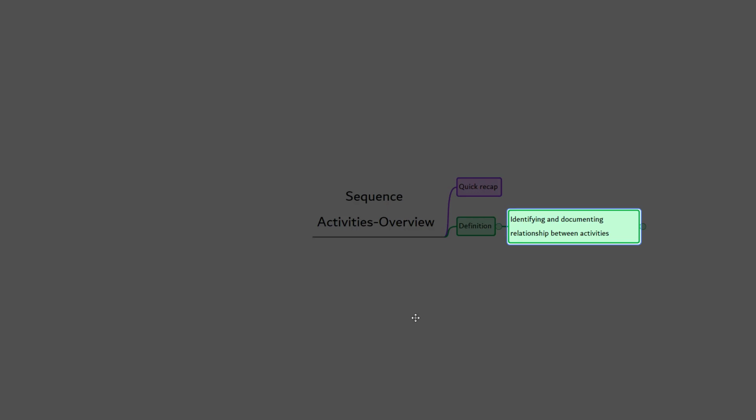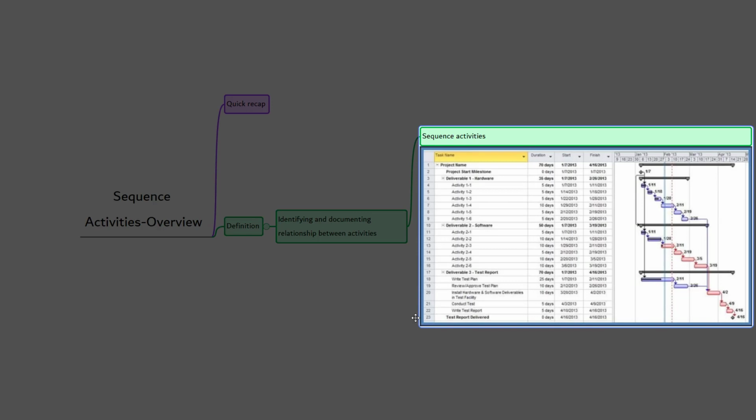Generally, every activity except the first and the last should be connected with at least one predecessor and at least one successor activity with an appropriate logical relationship. Anything which does not have a predecessor or a successor most likely will have no connection to the deliverables. This ensures that all the activities are necessary for the project.